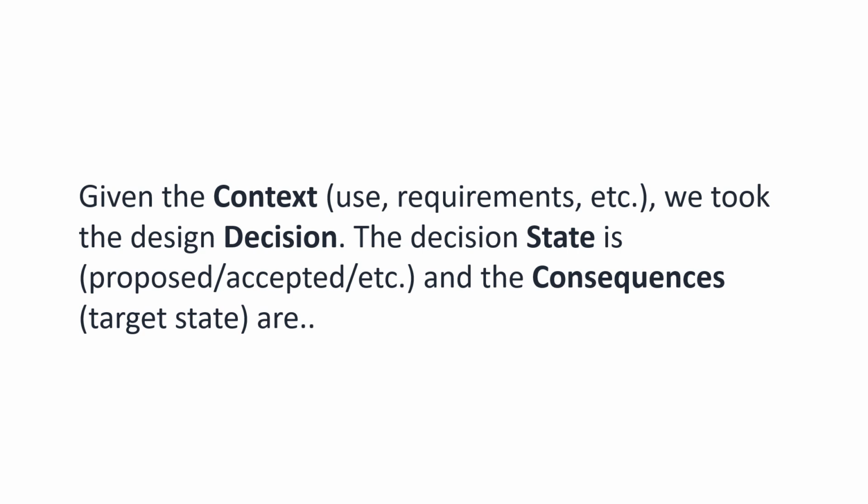An agile way is to leave the full document for late in the SDLC cycle, but you can take notes on the design decisions throughout the development so that you don't lose any critical information. You maintain a log of all those decisions you made. And just before the final delivery, you can create the document and polish it.